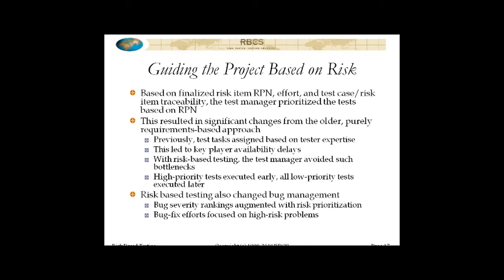Before, what had happened a lot was that the tests were assigned to testers based on their experience, like who's the most qualified to run this test. Well, what ended up happening was you had a handful of people who were like the key players, had the most experience, and of course they ended up getting most of the tests assigned to them. Unfortunately, not just most of the tests, but almost all the important tests. So what that ended up doing was delaying running of important tests, and thus the discovery of important bugs. So really late in the project.